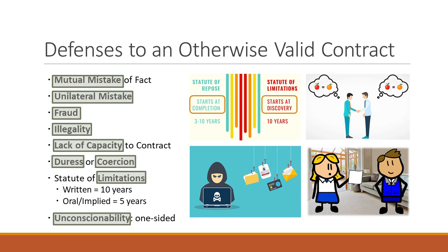So if the homeowner comes back to you from that first example and says, but you're a licensed architect, you should know this, the industry practice and most of the form contracts say, even if I should know this, it's typically an owner obligation to provide you that information. And as a result, because the industry treats it that way, I'm allowed to rely on your mistake. We have a mutual mistake here, and I'm allowed to rely on that when I quoted the price.